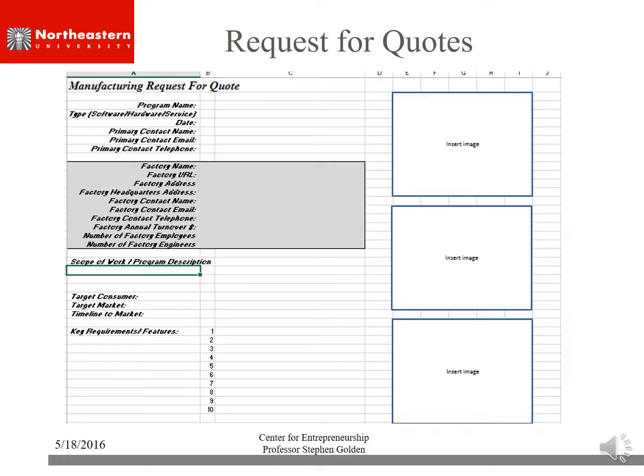Nobody's going to quote on those volumes. So we just kind of, as a rule of thumb, 10, 20, and 50. Even if I think I can do more, I just ask for those three numbers. I ask them to quote on volumes of 10,000, 20,000, and 50,000 over a 12-month period. They're easy numbers to work with, and you can extrapolate either way once you have those numbers.